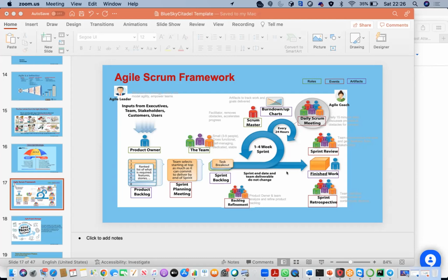For example, you have 10 user stories that you want to deliver, and they are all 5 story points. That makes 50 story points, isn't it? 10 user stories, and you have 10 working days to deliver them. On the first day, the team was only able to do 5 user stories. Second day, they couldn't do any. Third, they couldn't do any. On the fourth day, they were only able to deliver 10 story points.